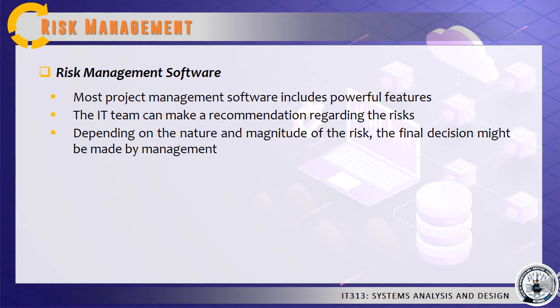Microsoft's risk management model includes the following factors. First is the probability, which represents the likelihood that a risk will happen, expressed as a percentage. The impact, which indicates the degree of adverse effect should the risk occur, on a scale of 1 to 10. Cost, which indicates the potential financial impact of the risk. Category, which specifies the risk type.